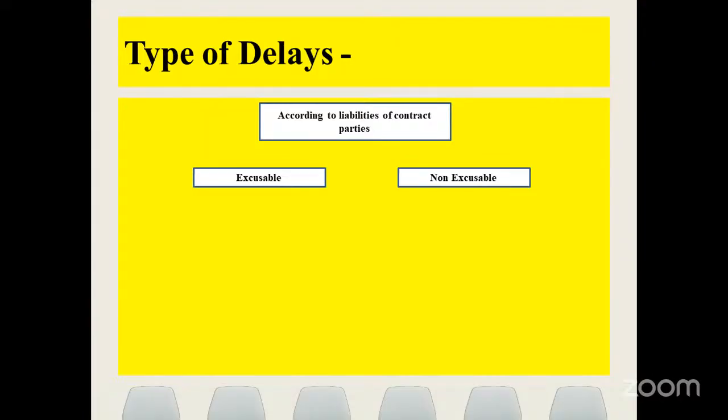I have additional time, or I'm able to complete that activity within time. But in some cases, what happened? That delay reflects. For example, when we construct a slab, we have a minimum waiting time of 14 days. So you delayed casting of the slab by 5 days. So those 5 days you again have to add to the 14 days of life cycle. So that will start reflecting on the next activity.